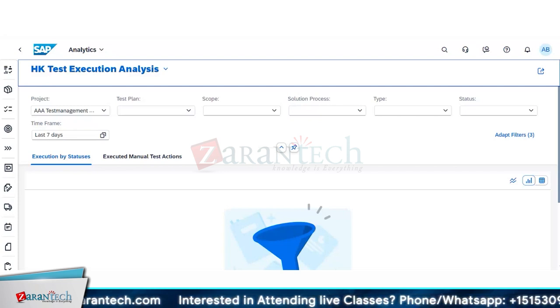And once that comes, you don't have an effort estimation on that because it's a new thing, right? So then it will take time. It takes time, so it is dependent. When we plan the testing cycle, obviously we take that buffer in hand, so that there will be time for working on defects, right?